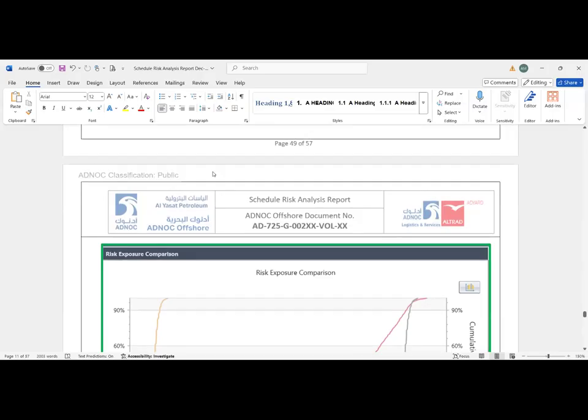That's why we have to prepare this report every 3 months. This is the report in December. And if I show you, there will be some risk changes and duration changes compared to when we did it last time in July. This is the frequency we have decided for risk management: after 3 months we have to do the risk analysis.